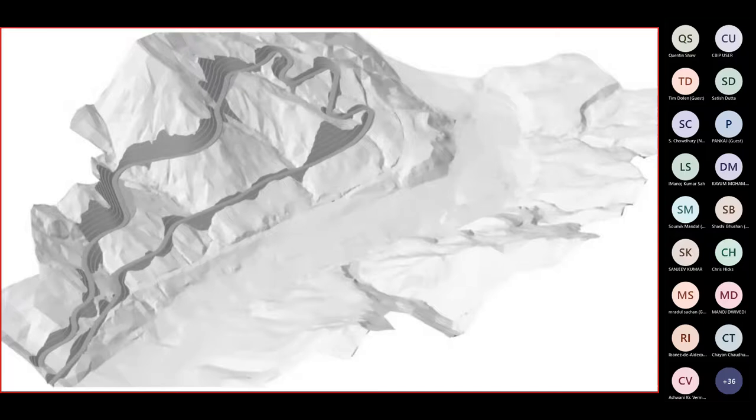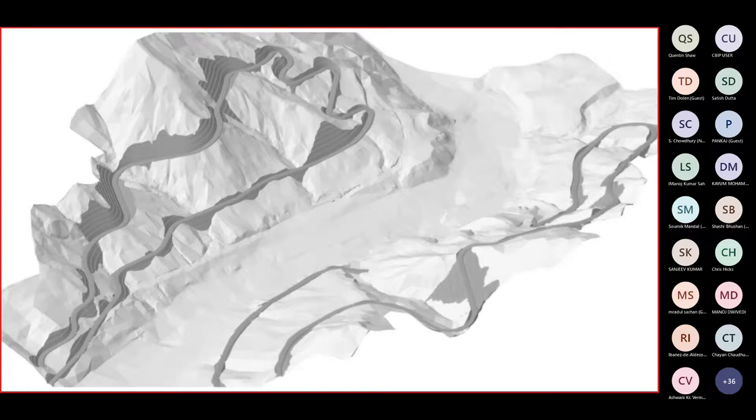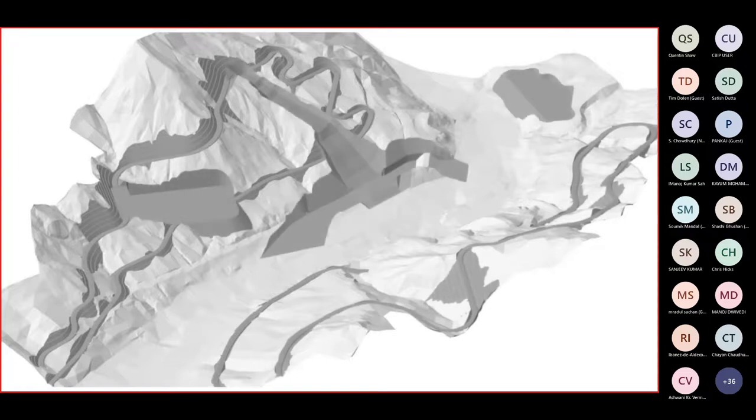This is a slide showing some of the dynamic aspects of a BIM model during the early stages of construction. You can see the simulated progress of the work, namely the haul road and other temporary earthworks, as well as permanent earthworks, various stages of the river diversion concrete construction. You can also see the river diversion sequencing, including upstream, downstream, and temporary cofferdams.